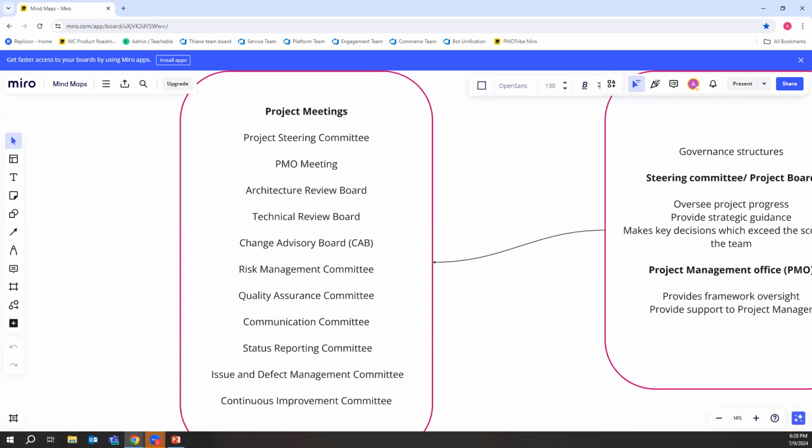And so what that does is every other stakeholder sits there and they're like, but we're not interested in this. So we're spending 2 hours, 3 hours in a steerco doing project management meetings and updates. So what we decided to do was to have a separate session with him where we share the detail so that we could have a more constructive steerco session, right? So you have to think about that very carefully.